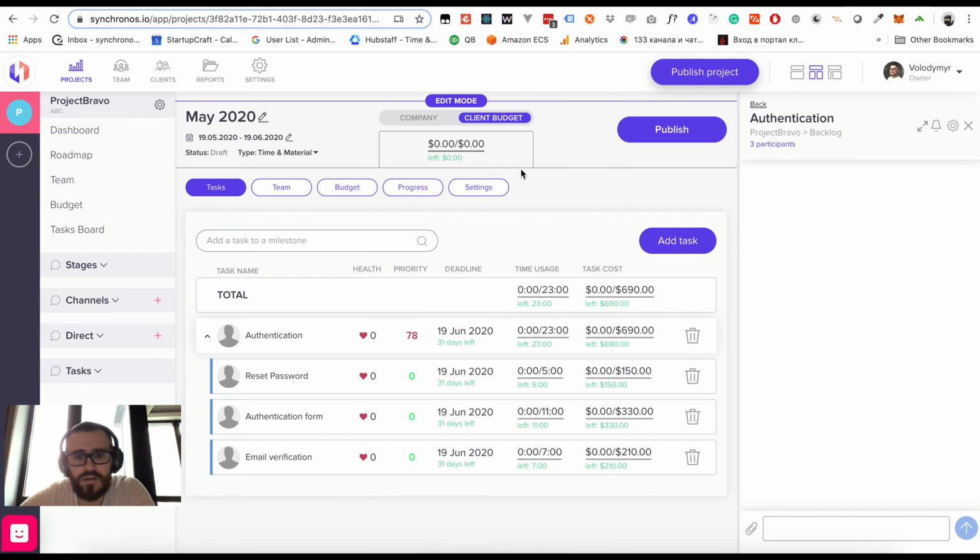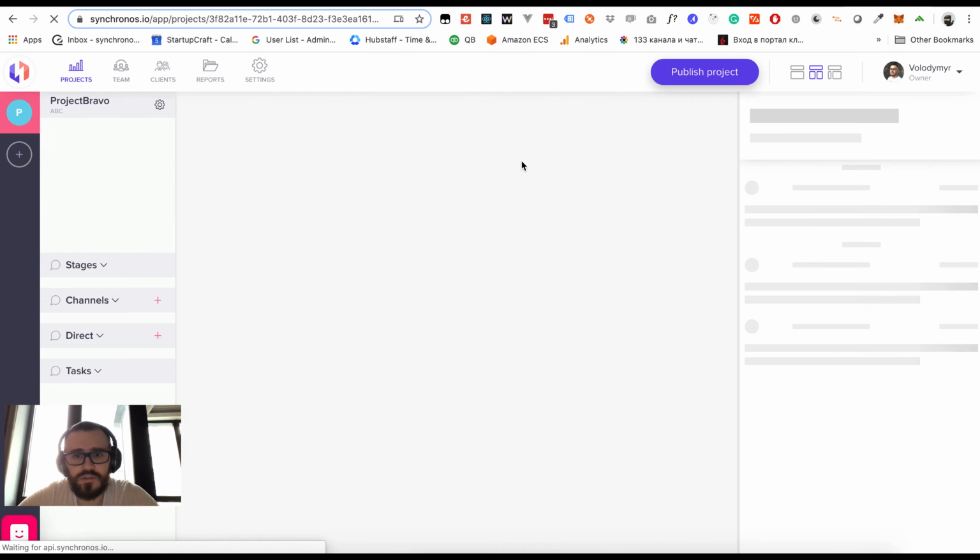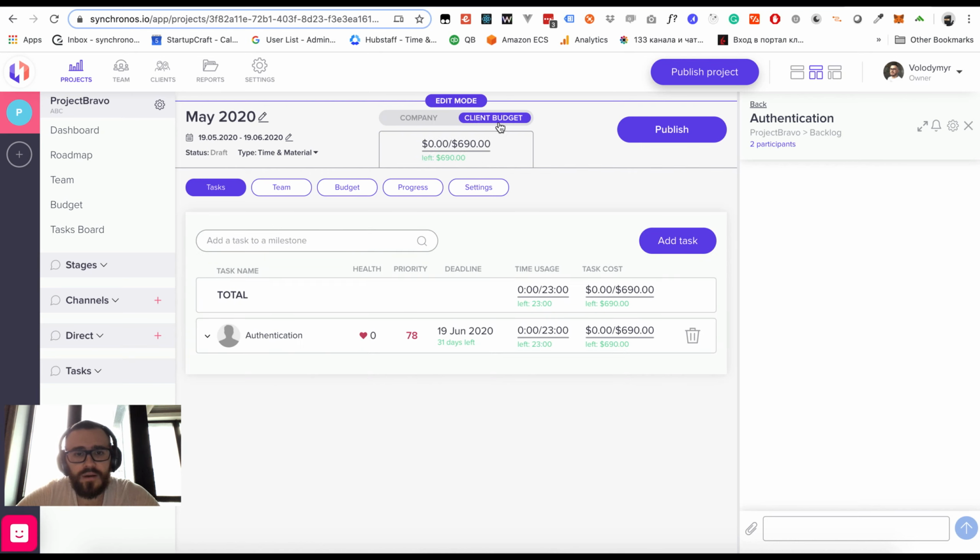Right now it's 0. Let me refresh the screen. Actually, it shouldn't be 0, to be honest. Yeah. Oh, it's not 0. I'm just saying 0 on the side because nobody has spent the time. So what's the difference here? You as a company would like to see pay rates here. If a worker we have created has $10 per hour, you want to see the actual amount you have spent, so you can understand your current margin, like gross margin. And for the client budget, they are going to see the white-label rates, which is like $30 per hour, and it would be this amount in total that they're going to track when they track 23 hours.